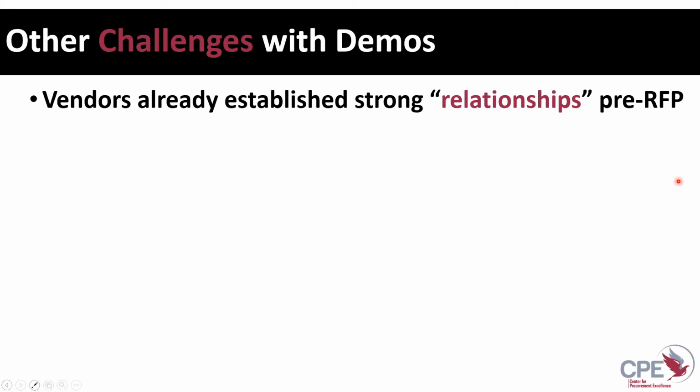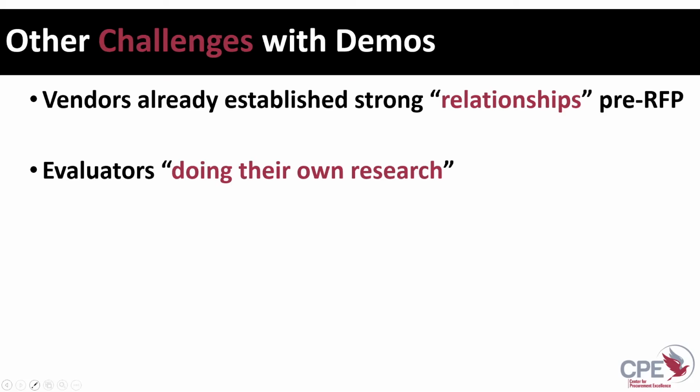They've actually already seen some of this. They've been demoed before, outside of the RFP process. You'll also get an increased risk of evaluators doing their own research in these demos, going to vendor websites, trying to see what's there, see what videos are already populated there to get some extra information. The challenge with both of these bullet points, of course, is that there's a risk of our evaluators bringing in extra information outside of the proposal process to inform their decision, which is major red flag territory. So got to watch out for that.